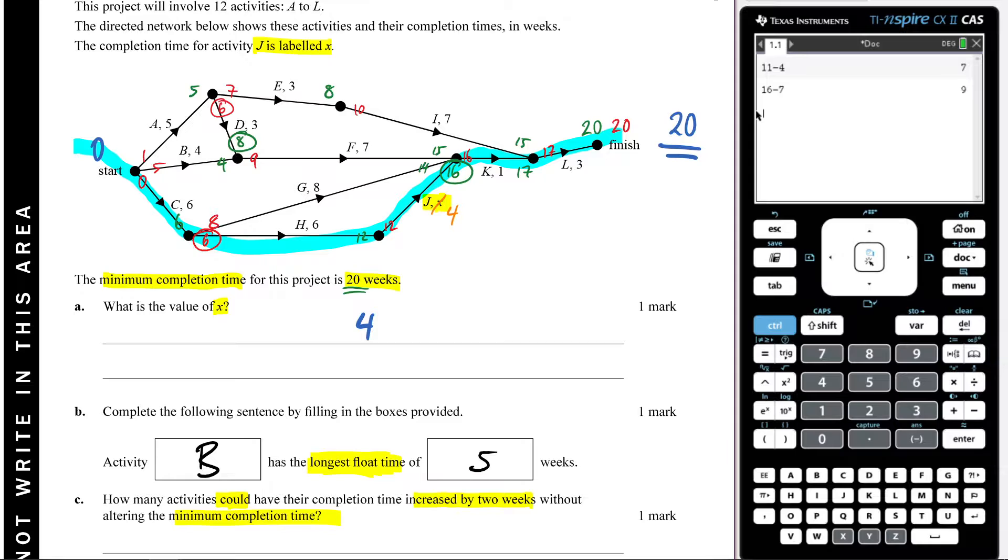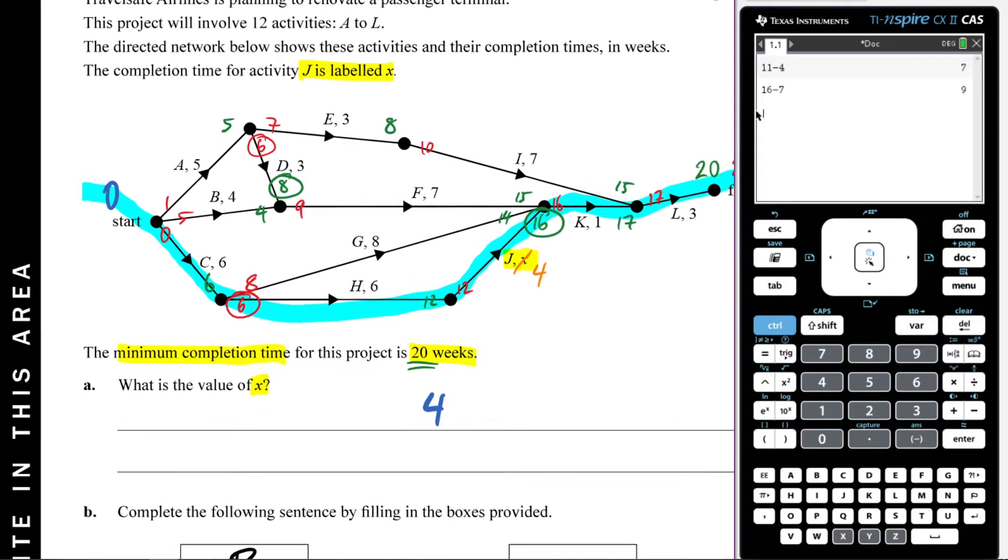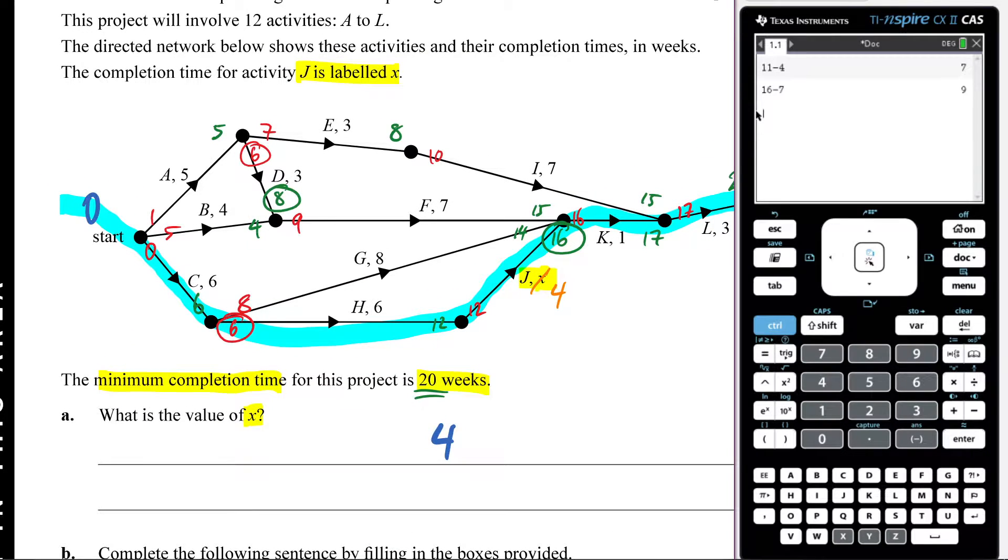So looking through these, I just said, alright, which of these have a float time of two or greater? So I could bump up, and I'll do this in orange. I has a float time of two, because ten minus eight is two, so I is one of them. So let's circle I.